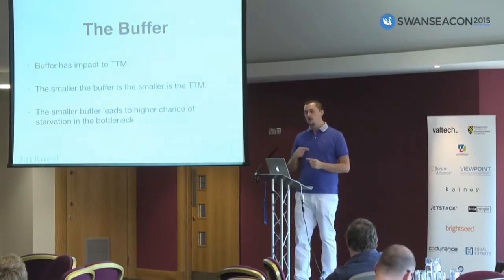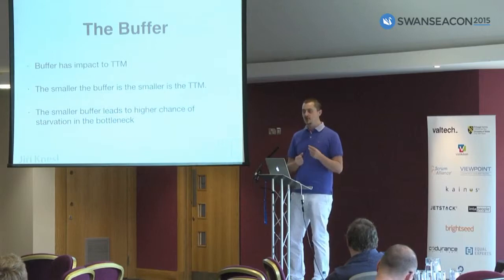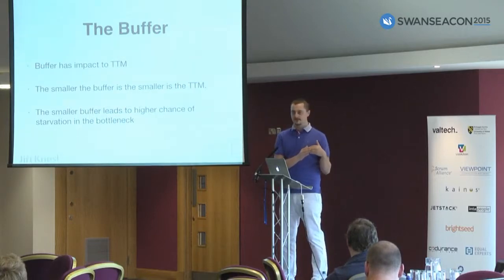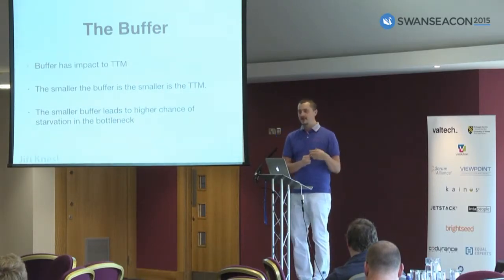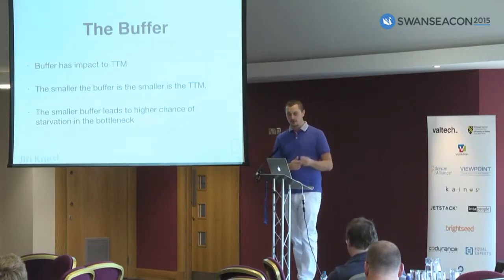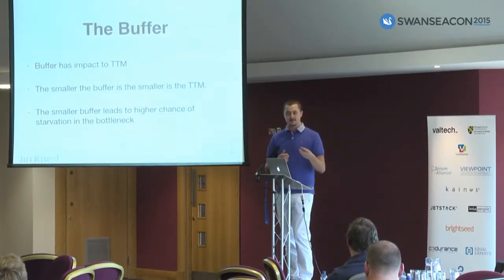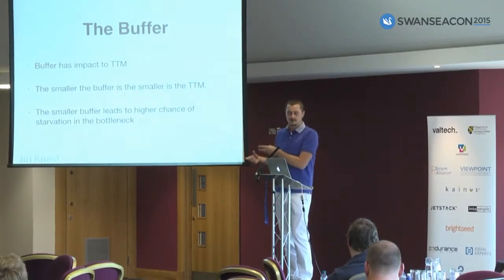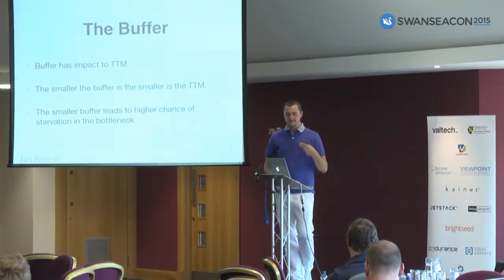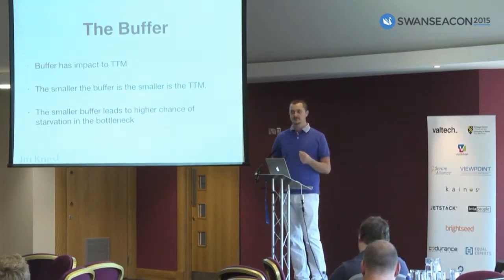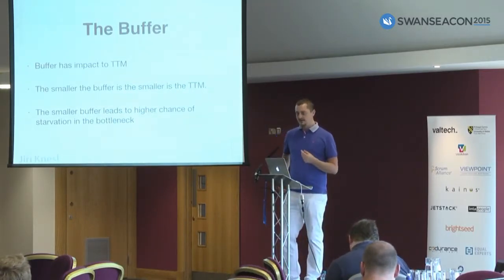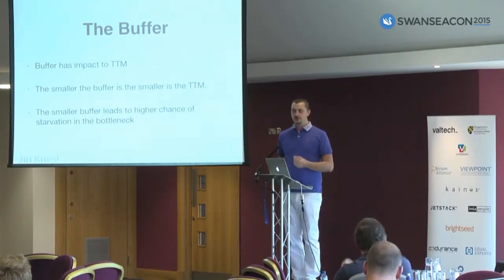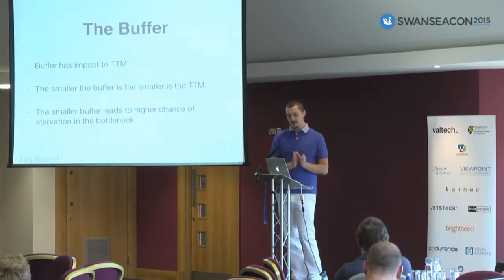Of course, you can reorder items in the buffer. So when some item is very important, you can move it to the top of the buffer. But when you move items in the buffer, everything gets more complicated, and the other items will have a longer lead time. So in the end, the average lead time will still be the same, and you will still be less responsive than is necessary. So one of the things is you should try to have as minimal a buffer as possible.